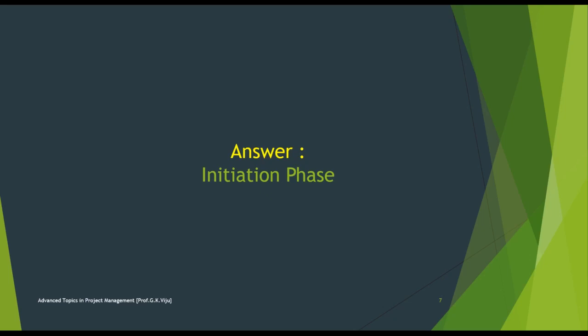In the scenario described over here, you are about to start a new project phase. Therefore, you should start with the develop project charter process. It does not necessarily mean you would develop a new project charter for each consecutive project phase, but it means that you will perform the processes of the initiation process group starting with the develop project charter process.